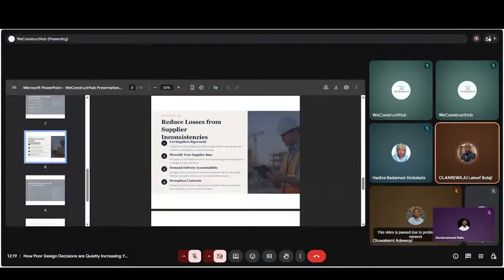You can even put a call to the company, check it out. How viable is this vendor? How good are they? They said they are partners to this OEM. Can you go online on the website of the OEM to even verify if these vendors exist on their website? Do they have a certificate of distributorship, for example? Do they have anything to show that this particular partner actually works with the OEM? These are ways that you need to verify that this vendor we are actually talking about knows what he's doing. In summary, I think I've already overused the time.